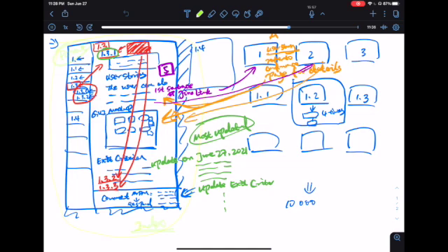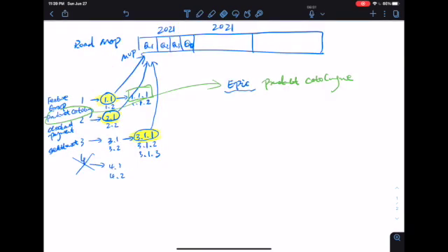Yeah, but what I'm trying to say is don't write too much detail in Jira because they're going to get lost eventually. So try to put more focus on documenting things in Confluence, and Jira is just a tool for you to assign the task to the developers and testers, and then during and after each sprint, the Scrum Master is able to get some stats out of Jira. That's basically all that Jira can give you.